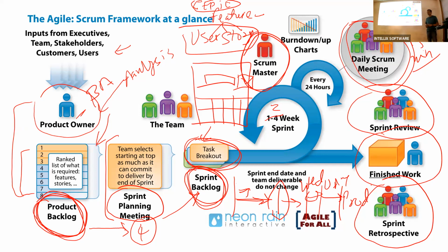Do you keep the burn-down charts forever or only for the project? No, for the sprint only. Once you have a new sprint, you will have a new burn-down chart. Every 2 weeks, a new cycle. Do they compare who is performing consistently? They will know. Depending on the complex work you are doing versus simpler work, if that guy is still taking 40 hours to do the simple task, then they will know who is doing the real work.